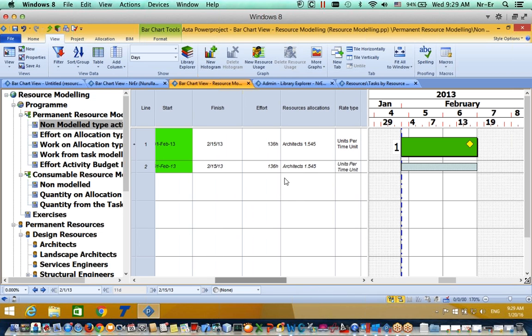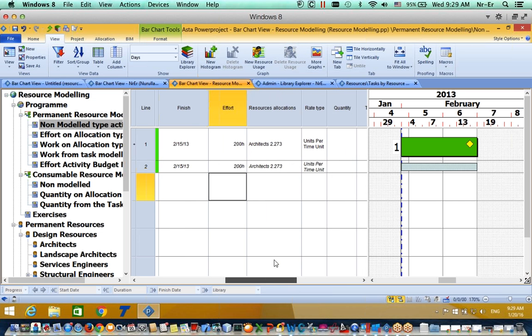Before, I gave the system my effort, the total work, or I can also change it. Let's say this is 200 hours, and the system automatically calculates for the 400 effort that I need two architects.